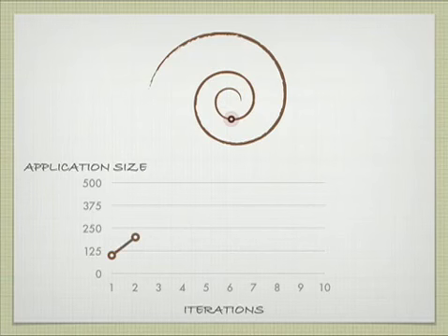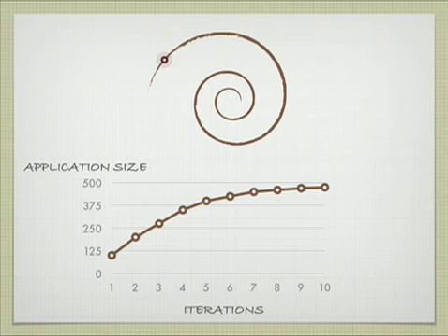After each iteration, you should track the size of the application. The application will grow after each iteration, and at some point in time, the size of the application will start to flatten out. In other words, each successive iteration will have less and less growth.